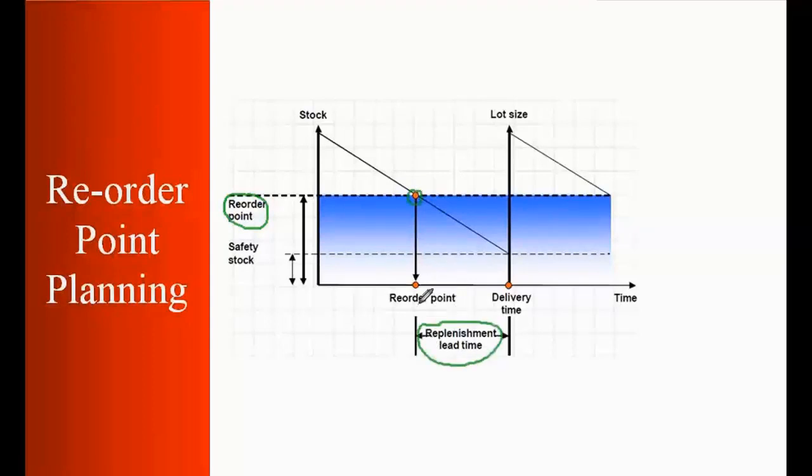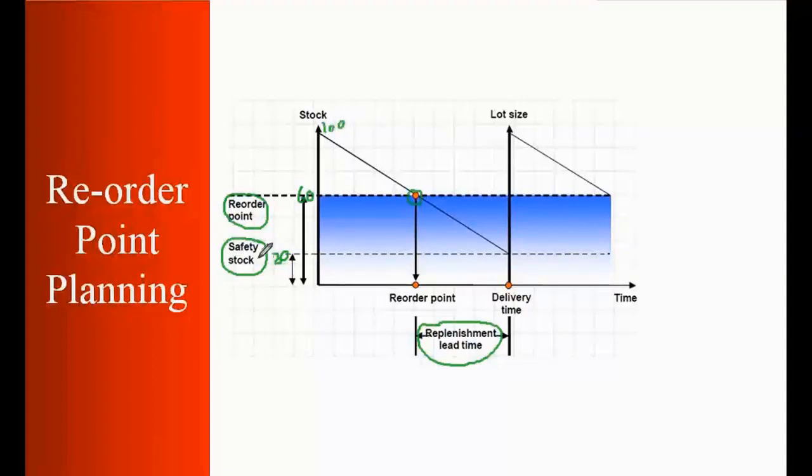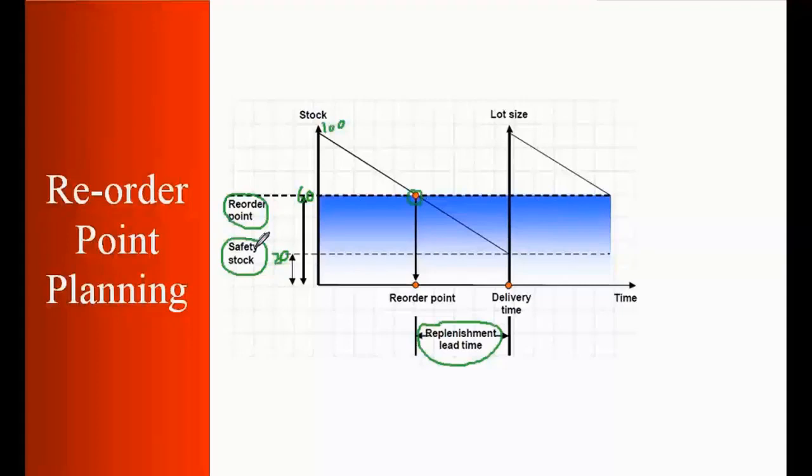That is fine. But here we also need to make another point into consideration which is known as safety stock. What is safety stock? That means we can say we have 20 pieces of safety stock here. And here I can say this is 60 pieces where we are placing an order, reorder point. And total stock is, say, 100. So safety stock is 20 pieces. So safety stock is something that if something by chance, if there is another requirement, then we need to have some stock in safety, like we keep the money in our bank just for safety. So we don't spend all our salary. We keep some money for the rainy day just in case something happens. So we should have some money in the bank as spare. So that's like safety stock.